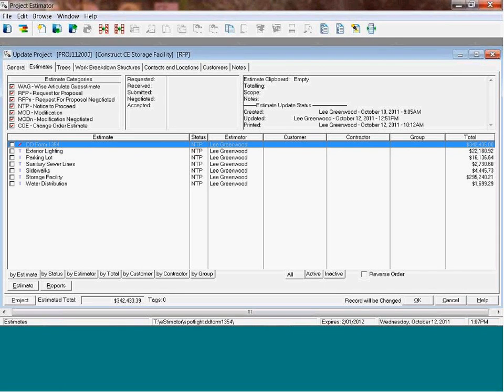So where we are right now is we've got a project that's built of multiple estimates. There are a couple of different ways you could do a DD Form 1354. One of the ways that our current users are doing right now is they're probably going into one or more estimates, copying one or more line items from those estimates into an estimate called a DD Form 1354, and then exporting out to that particular estimate. That's certainly one way of doing it.